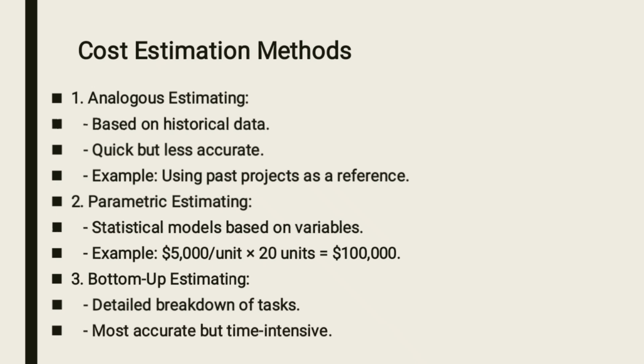So this one is most accurate but time intensive because you are trying to break down the whole of your project to say in our project we have got this piece, right? You are trying to do what we call work breakdown structure. So for each work breakdown structure you are trying to cost that one. So by the end of the day, it is time consuming.